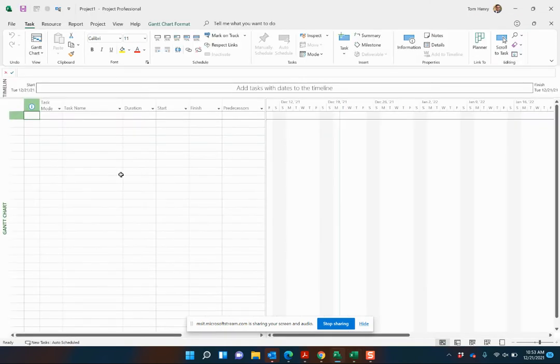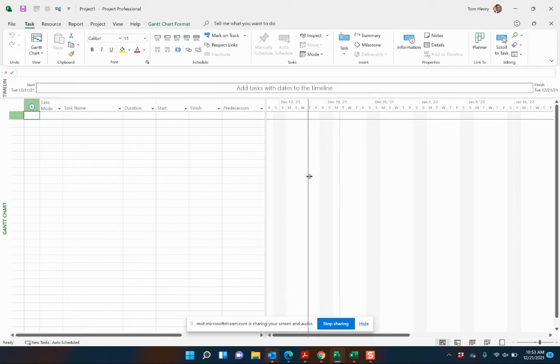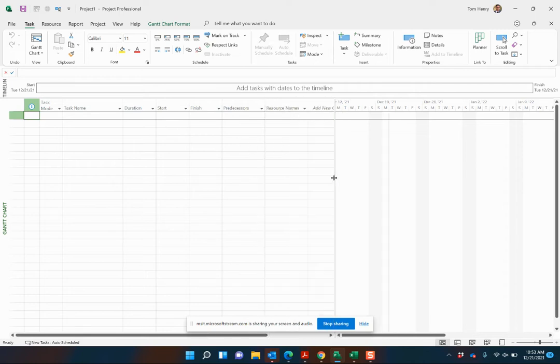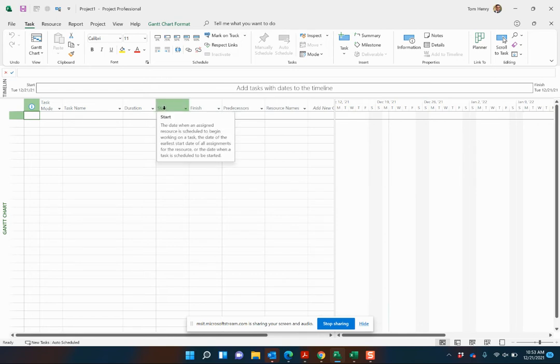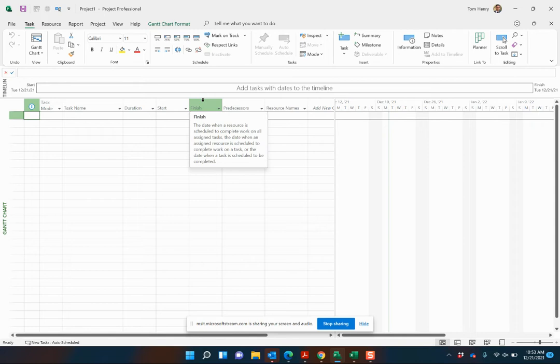So here we have Microsoft Project. A couple of things before we get started, but number one rule: do not enter start or finish dates into Microsoft Project.